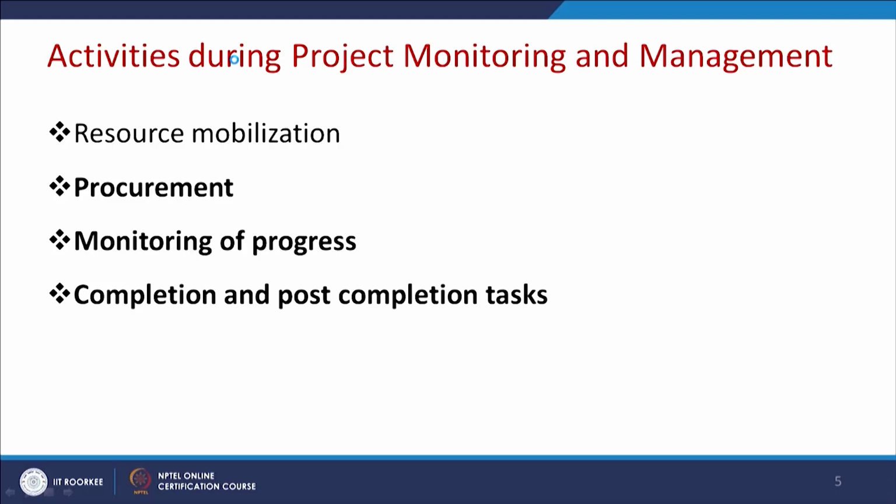Now please see the activities during project monitoring and management. The first is resource mobilization. Whenever you are formulating the project you are identifying the possible resources, but it is very important to mobilize the resources before starting. During project formulation you make a full detailed description of the project, and as per the description you estimate the project cost and send it to the approval authority or the funding authority.